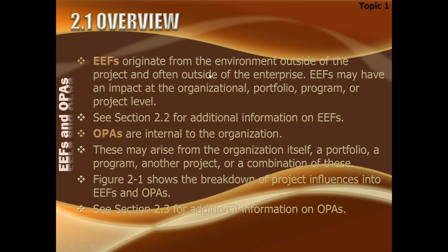So enterprise environmental factors, as I said, originate from the environment outside of the project, often outside of the enterprise, and sometimes inside of the organization as well. EEFs may have an impact on the organizational, portfolio, program, or project level, and we'll talk about these. OPAs are internal to the organization. OPAs, organizational process assets, are always internal to the organization. Any rule or regulation outside of the organization is not an OPA.